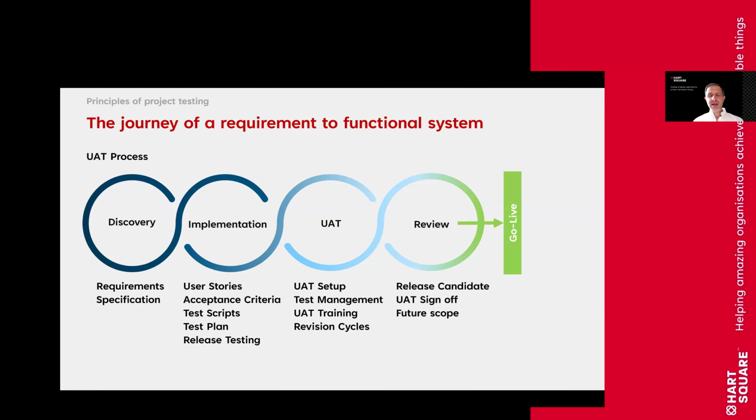Assuming everything goes according to plan and you get to a position where your release candidate is successful, you can then go live. And then I thought it was just useful to illustrate that post go live, there's a period of what sometimes gets called hypercare or intensive care, where the solution is now live and you do need a sort of increased degree of support from your implementation or your development team or whoever's implemented the product to help support you through that.